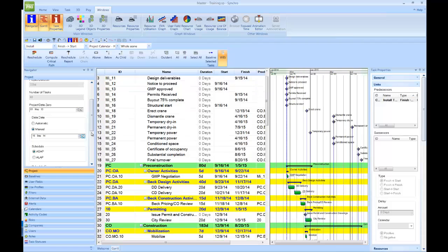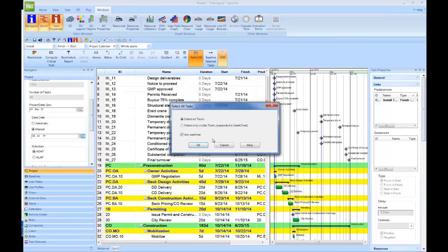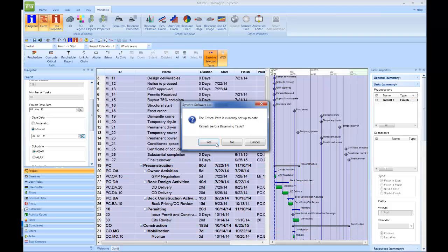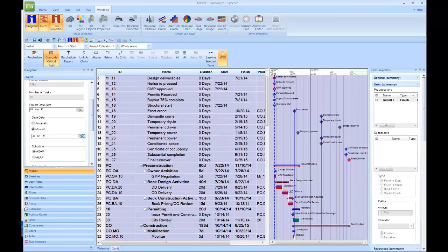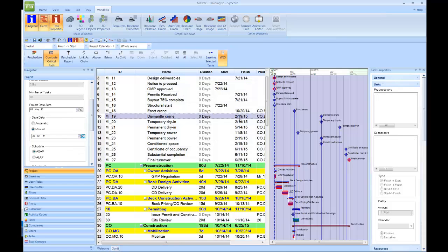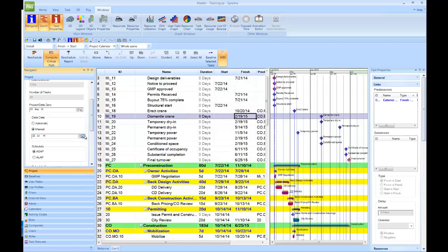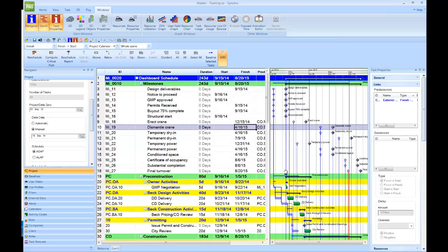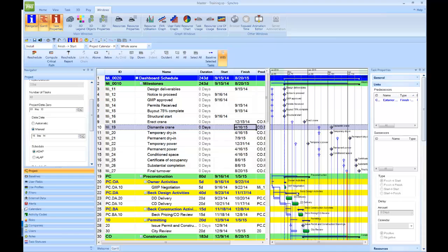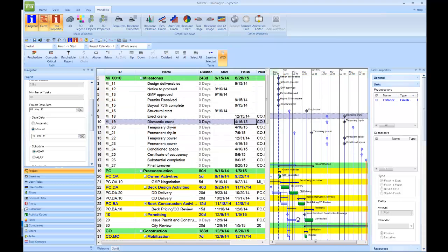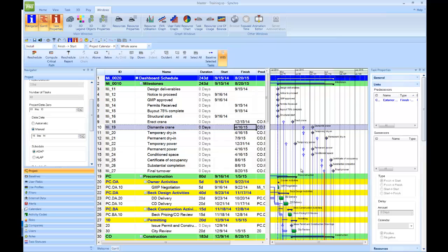Now it's obviously pushed out the entire schedule. If I were to go back, what would be best to do is baseline these tasks first, and maybe it's just that the job hasn't started. There's no reason or rhyme, it just has not started. But if we push out the schedule to today's date, you'll see a difference. Here is where we originally were planned to be, and here's where we're planned to be now. Now the end date has pushed out to 8/20/15.